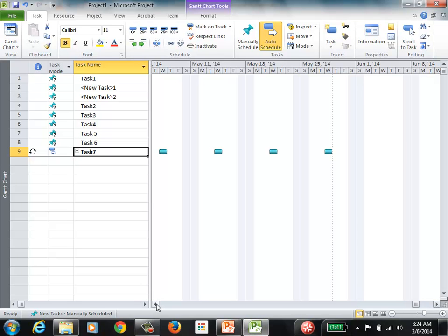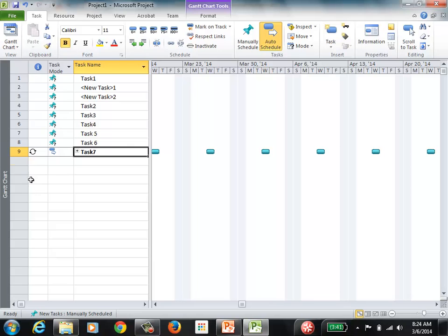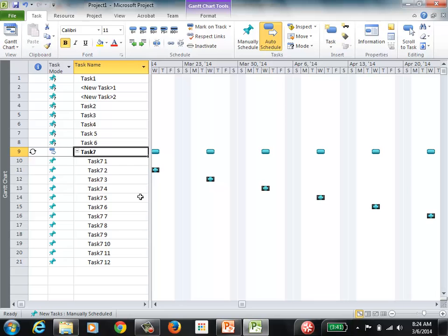One thing that you can notice here is that when you define a recurring task, you will see that icon here that basically tells you this task occurs 12 times, so this is a recurring task, and it gives you the information about the task. Also, if you open that plus sign, it will list the number of times that task is going to be repeated, and it will give you the duration and also the way it looks in the Gantt chart. Any questions so far? Okay.